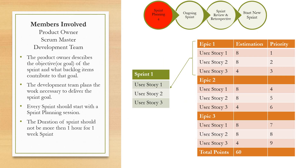The next stage is sprint planning. Members involved are the product owner, the scrum master, and the development team. The product owner describes the objective or goal of the sprint — for example, the goal would be to finish sprint one with login functionality. The development team then plans the work necessary to deliver the sprint goal. Every sprint should start with a sprint planning session, and the duration of sprint planning should not be more than one hour for a one-week sprint.